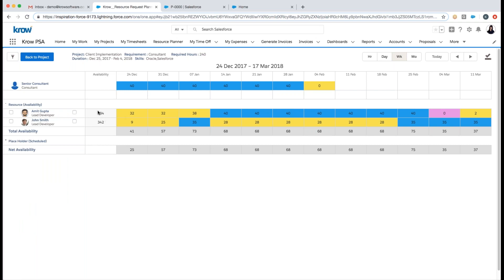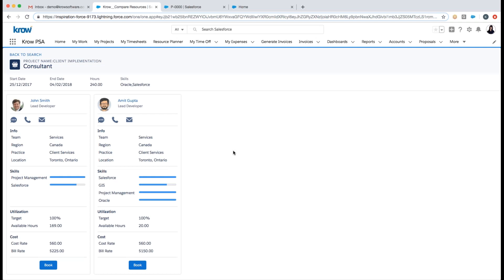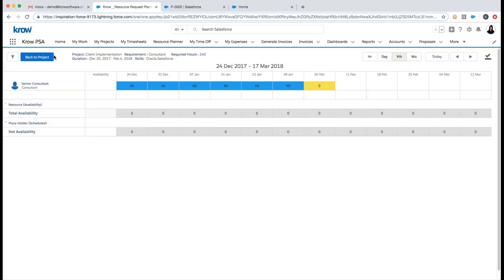The system returns people matching my criteria with total hours availability during the time frame. A unique feature of Crow is that I can see not only available resources from an hours perspective, but also the net availability taking into consideration placeholders not yet staffed on other projects that meet my search criteria. I can compare two resources side by side — seeing team, region, practice, location, target utilization, bill rates, and cost rates — then book and replace the resource on the project and all associated tasks. Crow also supports a resource request approval process for centralized resource planning.